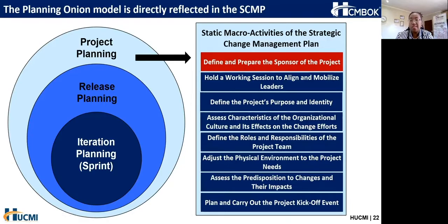So we spoke previously that the culture is something that is important to understand as far as possible, understanding the characteristics and understanding how it's going to affect the rollout. If we are implementing Agile for the first time in a very traditional waterfall organization, it's going to be met with some shock and resistance, and it's important to understand that right from the beginning. It changes the strategy you use to implement, and it changes the approach you may use for engagement.